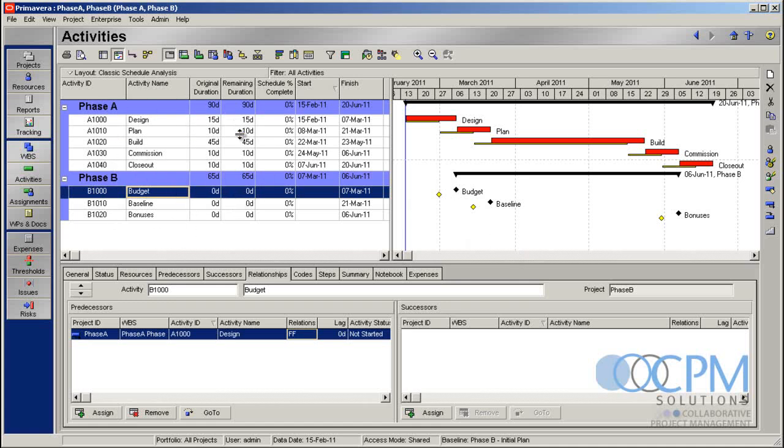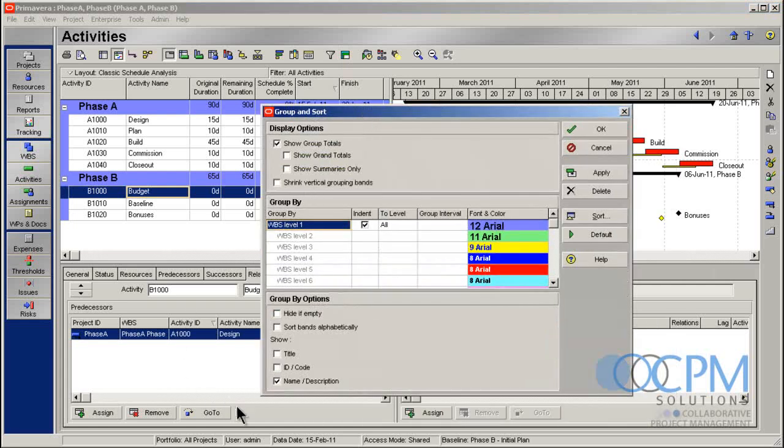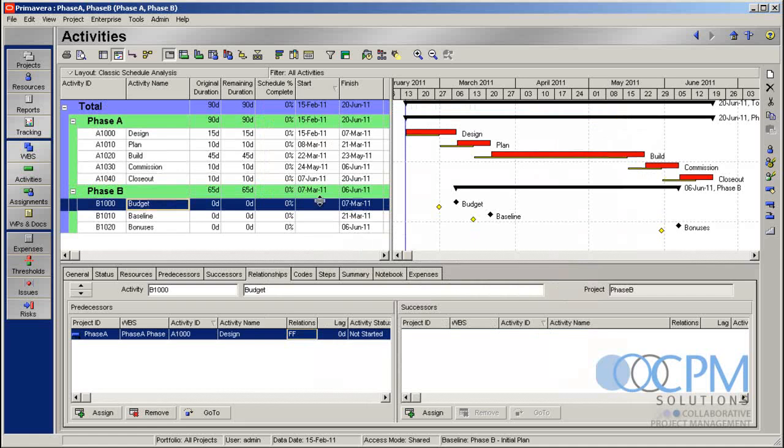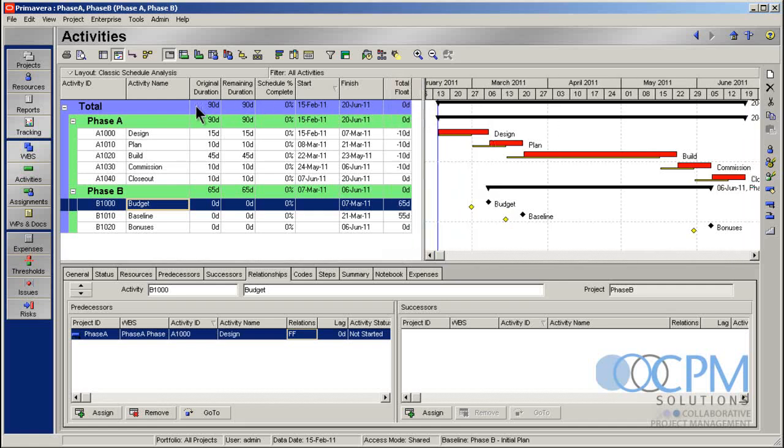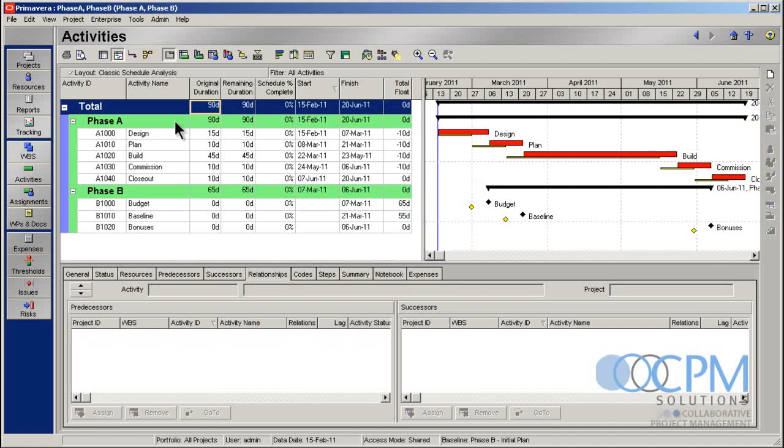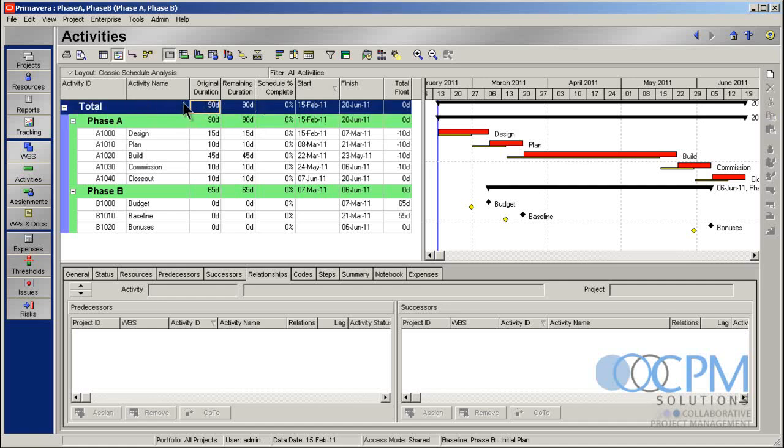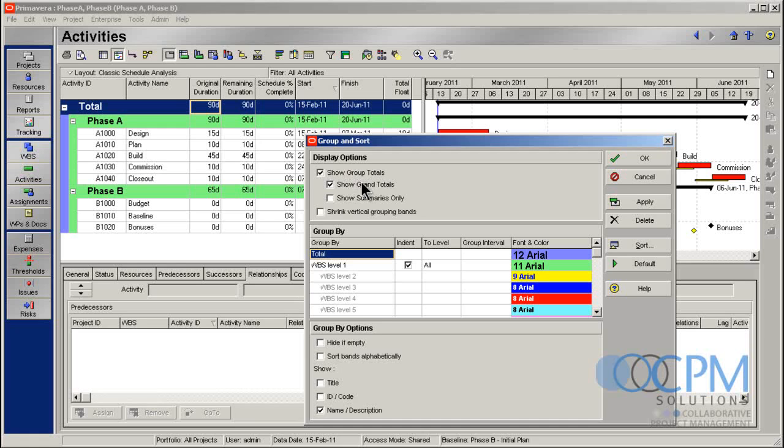Now, how do I get a summary of the whole thing? How do I get that master project? How do I get the summary of the whole project or both projects put together? Well, some nice features in here. If I go into my group and sort, right off the bat, there is this show grand totals checkbox. You'll notice when I turn that on, I get this total up here. Let's go see what that looks like. What that does is it actually puts this total bar up at the top, and that total bar summarizes both projects for me together. Okay. So I can see 90-day total. Interestingly enough, in this project, it matches the same as the phase A. So it's easy to get that total bar up at the top by just going in there and turning on show grand totals. So if you didn't know about that, go play with that.